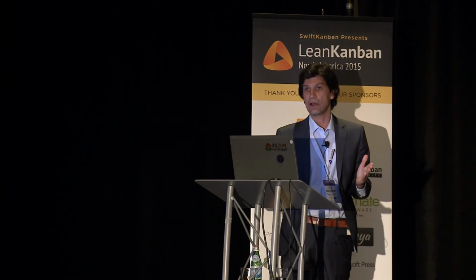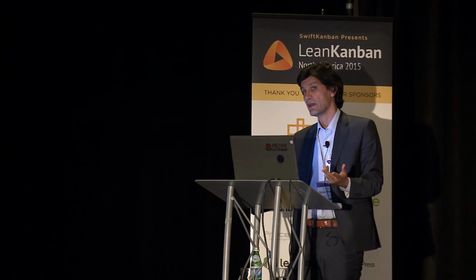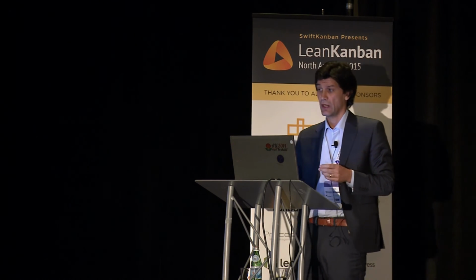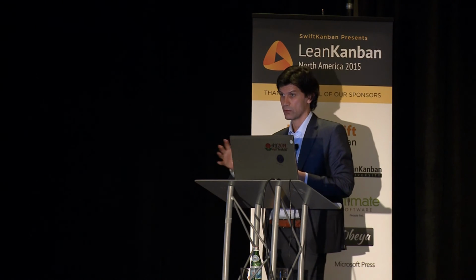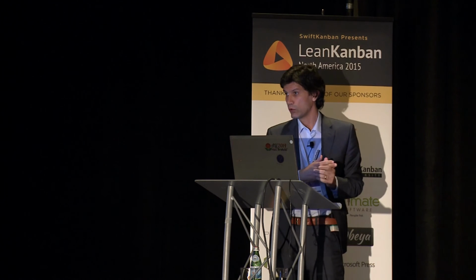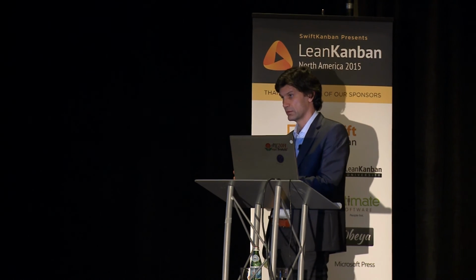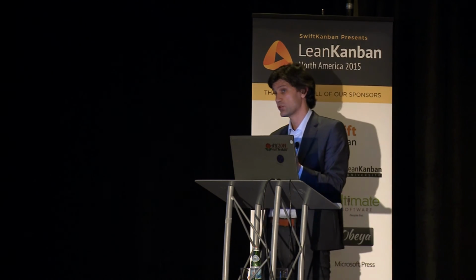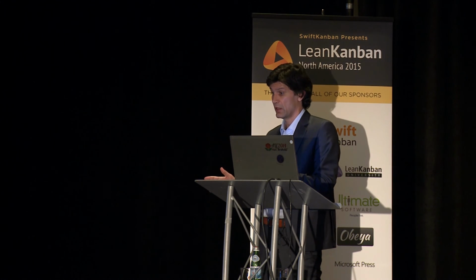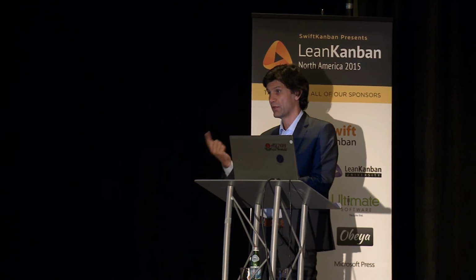What should we do? We have a 2,000 initial estimate, and we see that actually it's growing. There are two approaches, and I use the second one. The first approach is when you have something like a new requirement, let's say a whole new epic. You just erase your old estimated data, and you run the estimates again. So that's the first approach. The second approach is a bit easier. Let's say I have 20 epics and 2,000 acceptance tests, and I have one new epic.